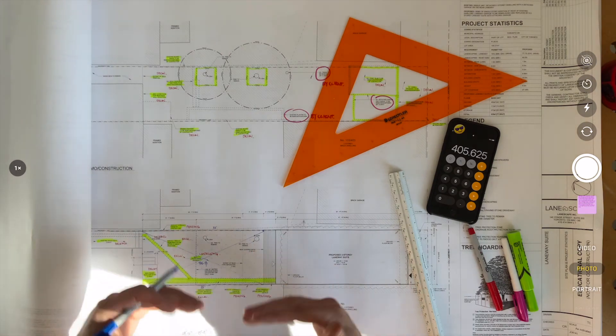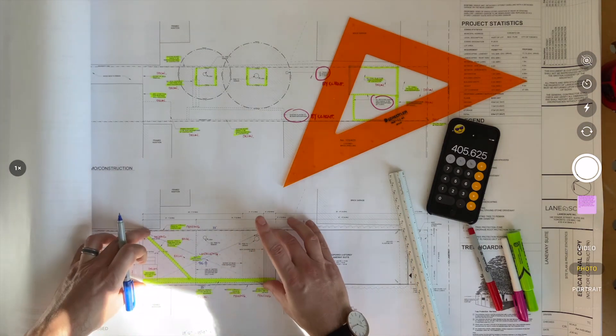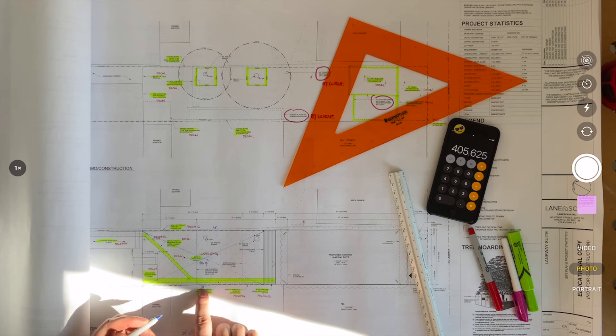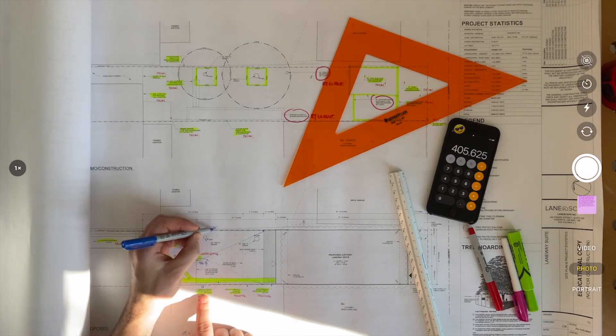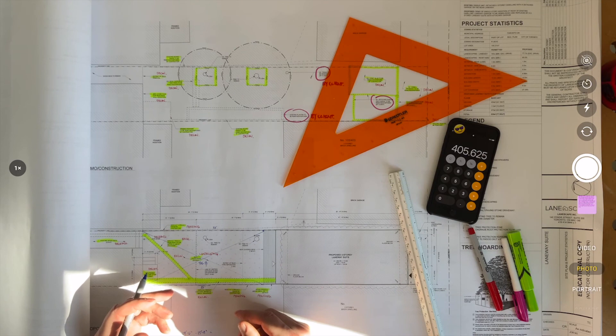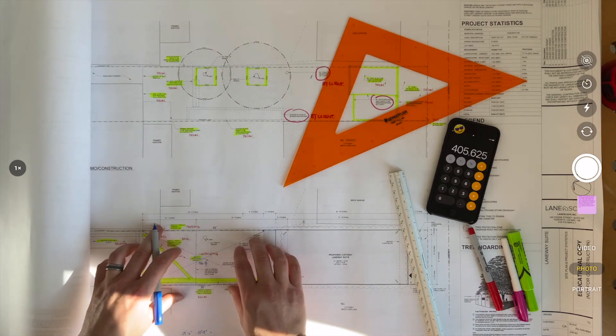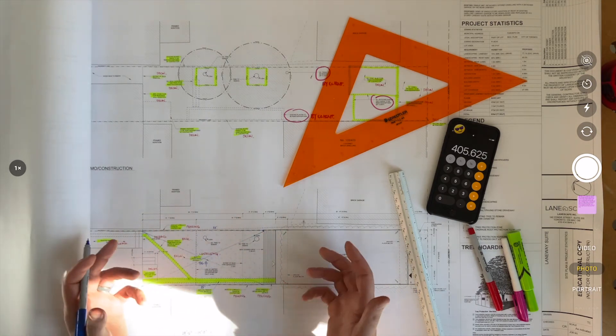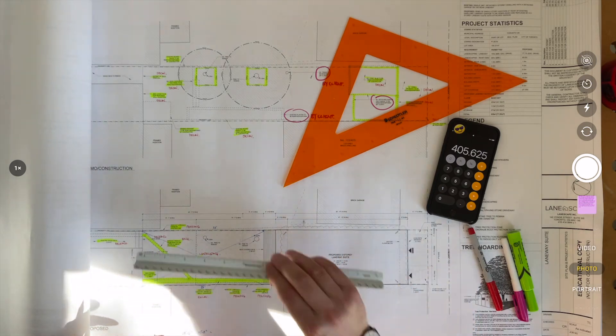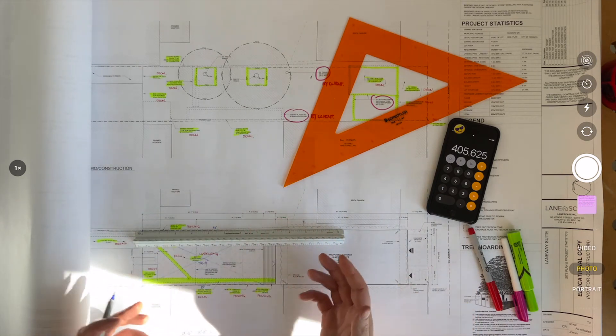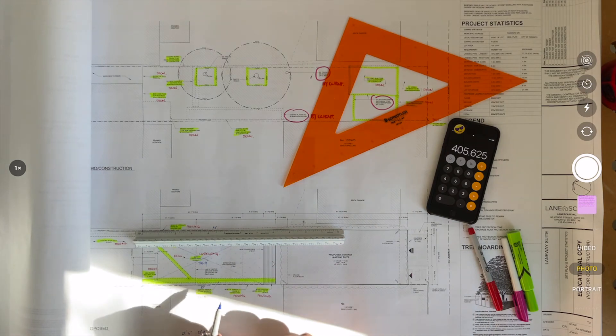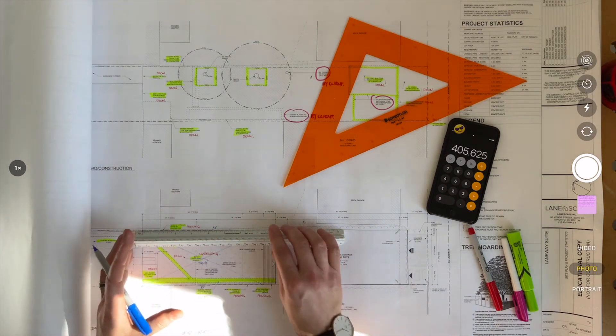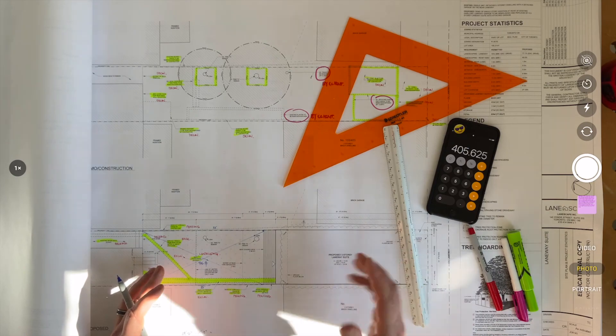So I'm referring to the new sod I need, which is under landscaping. Right below, I've already done myself a favor and written 406 square feet. So when I get to that category estimate, I have the area. When I'm looking at my fencing, I've reminded myself and written 33 on this side, 33 on this side. Always leave your dimensions, your notes on the page. If you're breaking out a set of plans physically, it'll help you out. And I never have to grab my scale again and measure it when I get to inputting it in my estimate sheet. So that's how we kick off looking at a site plan for activities. And next video, we'll get into framing.